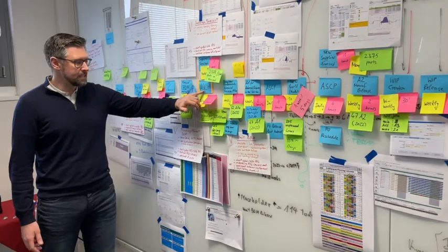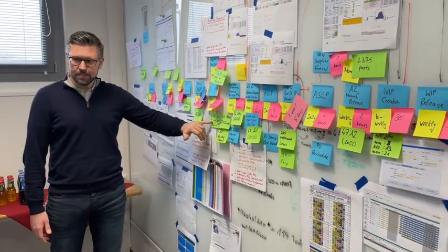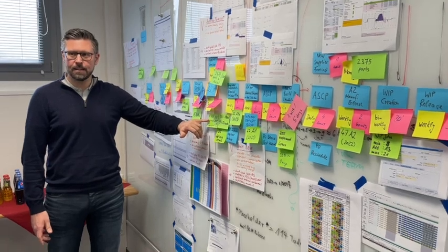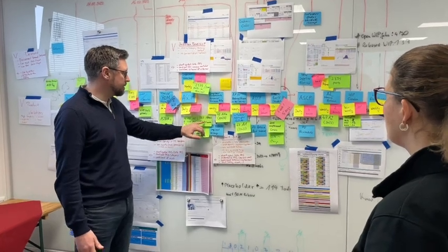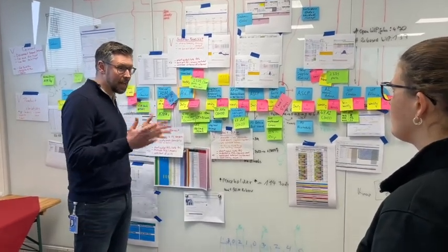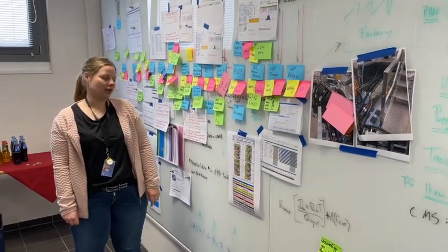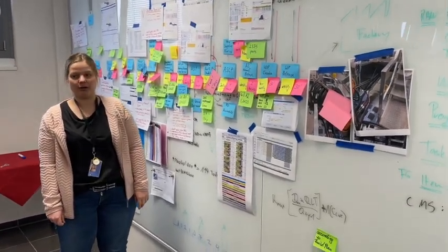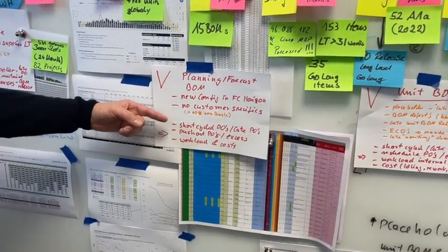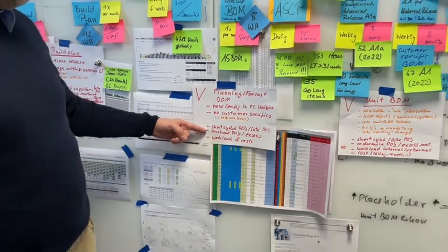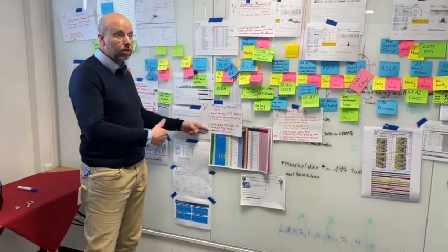When this ASCP tool is running, this is done overnight and 46 million lines are run overnight. Right now we have about 153 items that have a lead time that is higher than 31 weeks. When we have a new build plan on a monthly basis, it's changing around 33%. That also leads to short cycle time, or the POs are late, we have a push out of the POs, and we have a lot more workload as I described.